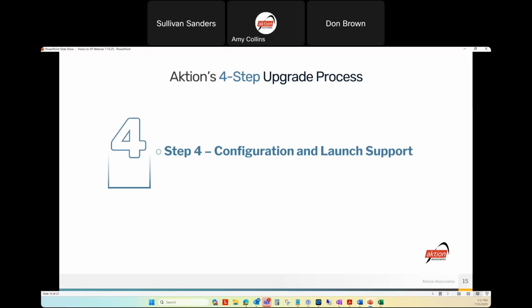Right. So the whole time we are going to be looking towards your go live date, right? So we'll get together and we'll pick a go live date. That go live date, you do that on the Deltek Support Center. We go on together, walk through the process, pick that date. And depending on how long that update process is, we'll pull a preview environment to begin with. And then as we get closer to maybe the super user training, we will do what's called a refresh, which is another snapshot of your Vision transactional data put into a new Vantagepoint database.